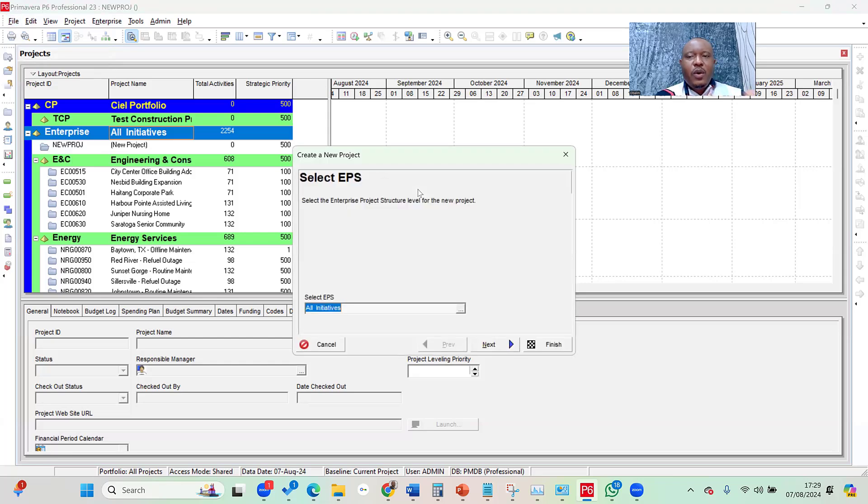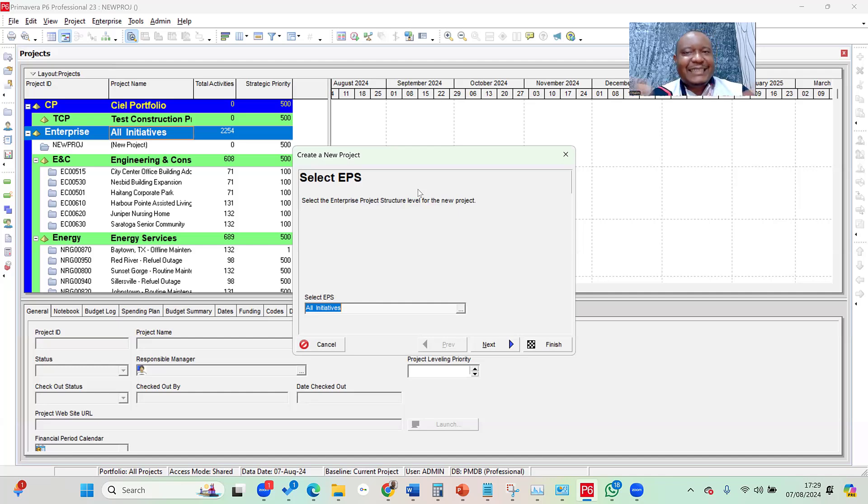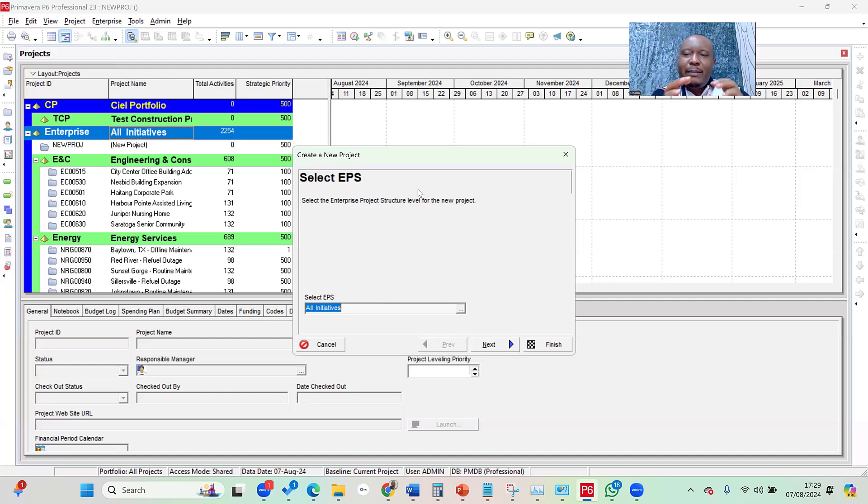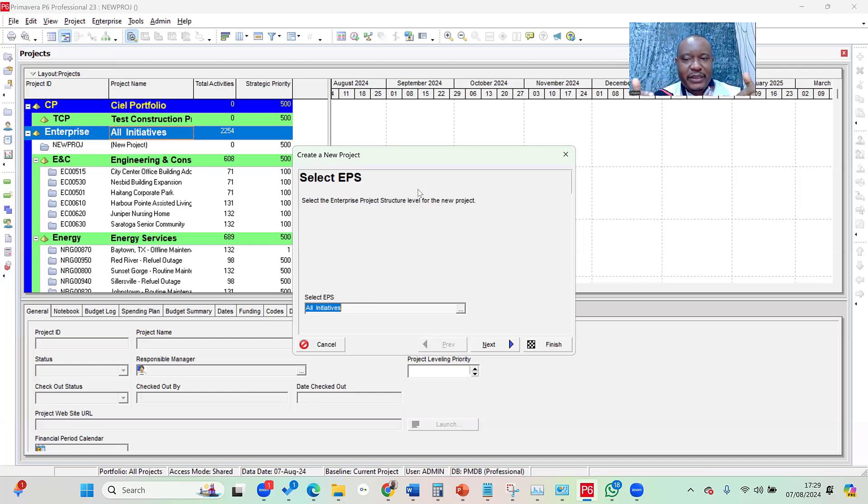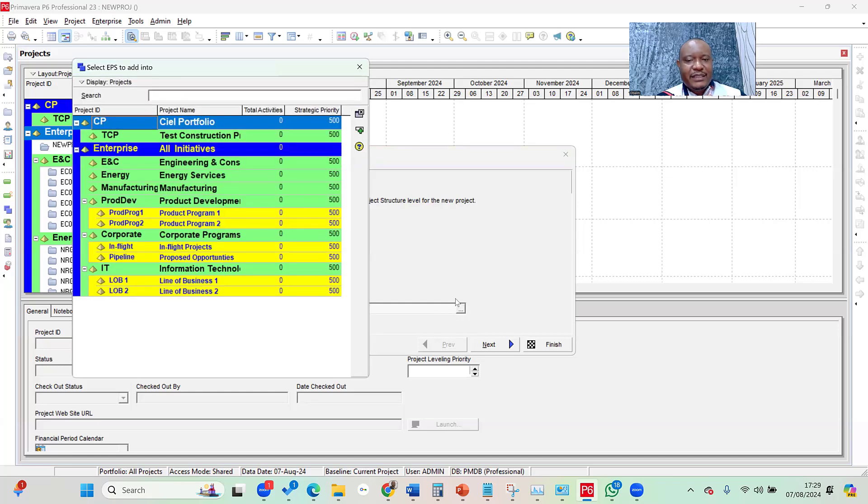So once you've clicked on new, the first thing it would ask you is to select an EPS. More or less, Primavera is saying, under which program do you want to put this project? And that's the question Primavera is asking, because every project has to be under a particular program or a particular portfolio. So that's why the first question you see when you're creating a new project, once the wizard pops up, is it would ask you to select an EPS. So to do that, simply click in the browse button where you have the select EPS, then select the EPS that you want it to be under.